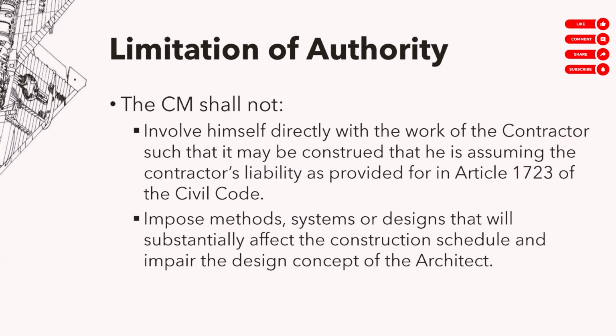Ang magiging problem sa ganyan kasi is, kapag may nangyaring masama, pwede sabihin ng contractor na, oh, that's not our work anymore. The CM did that. Okay? I mean, if it were up to us, we would have done it correctly, but since nakialam siya and may authority siya over us, we let him. But that's his work na. Nag-fail na, siya yung nagpagawa. Okay? So, if you notice, parang nadadamay na siya sa liability. Okay? So, hindi dapat gano'n. Dapat maingat si CM not to overstep the boundaries. Dapat malinaw na trabaho pa rin ng contractor yung ginagawa ng contractor, and therefore, pananagutan niya yun kasi gawa pa rin niya yun. Okay? So, yeah, yun yung una.